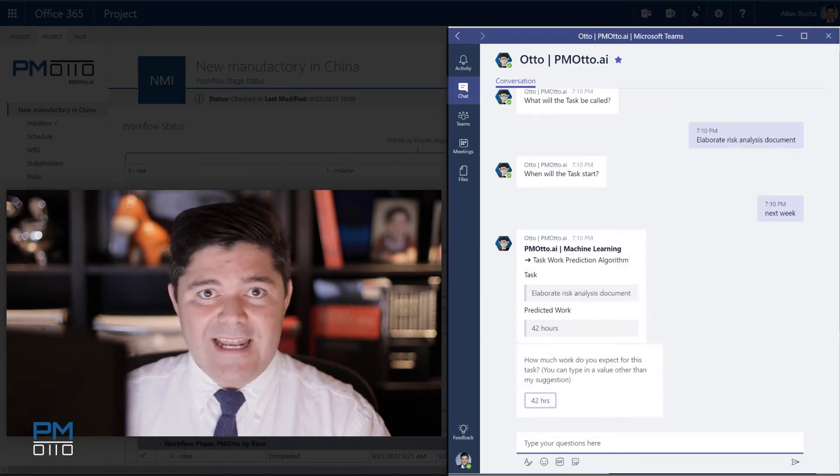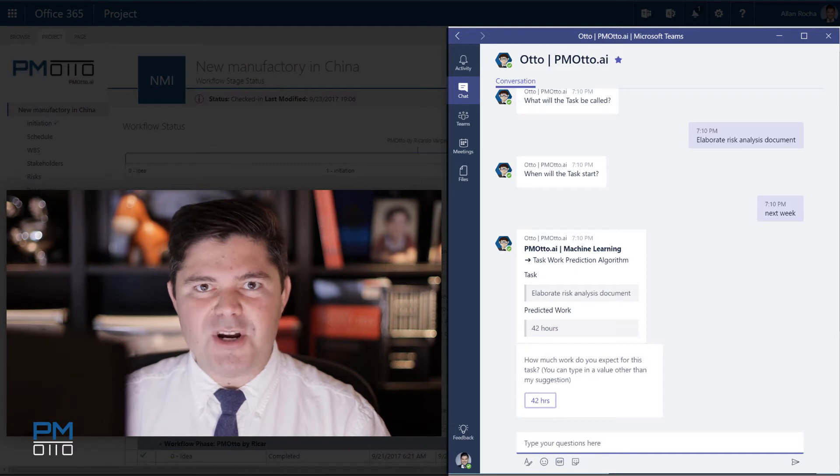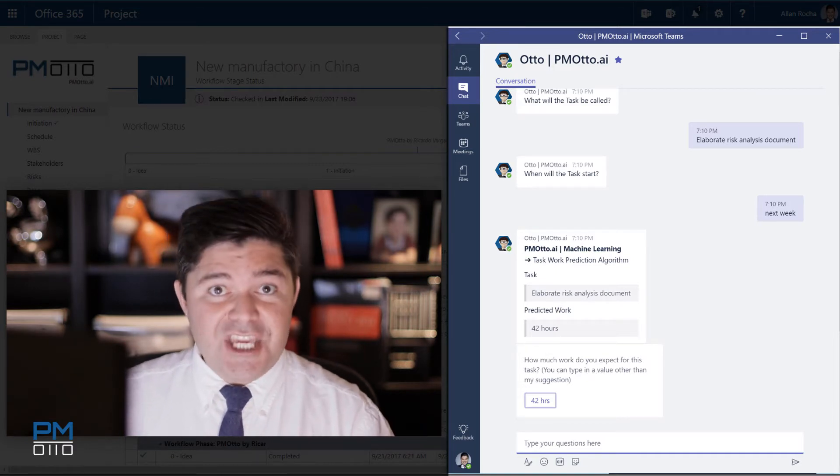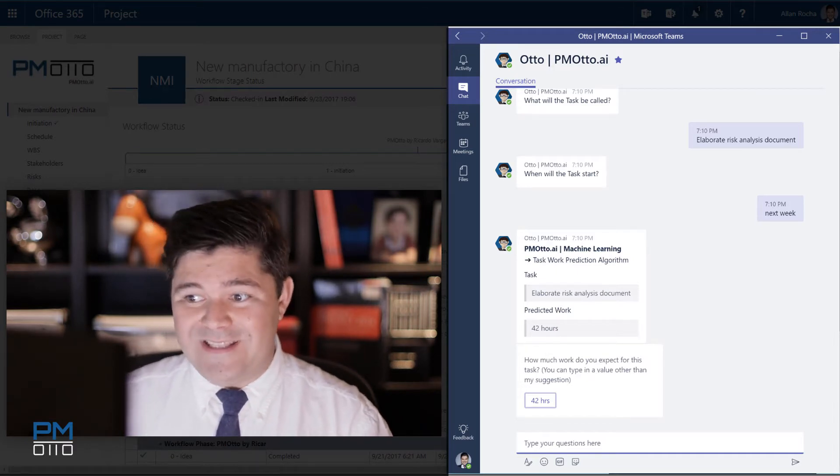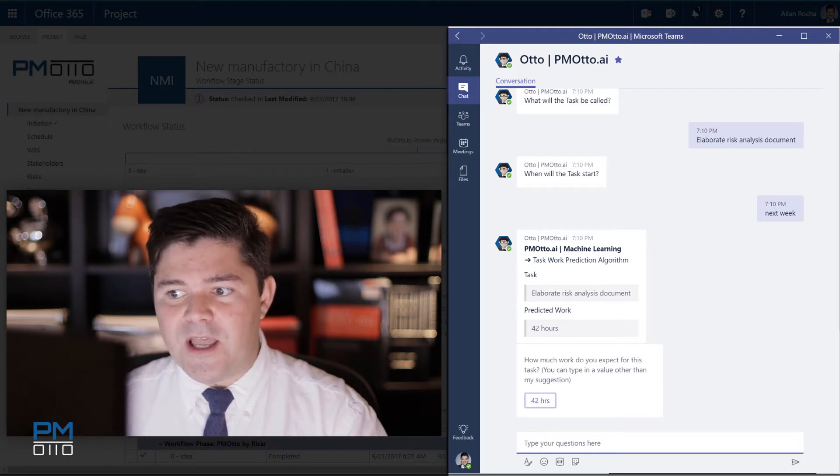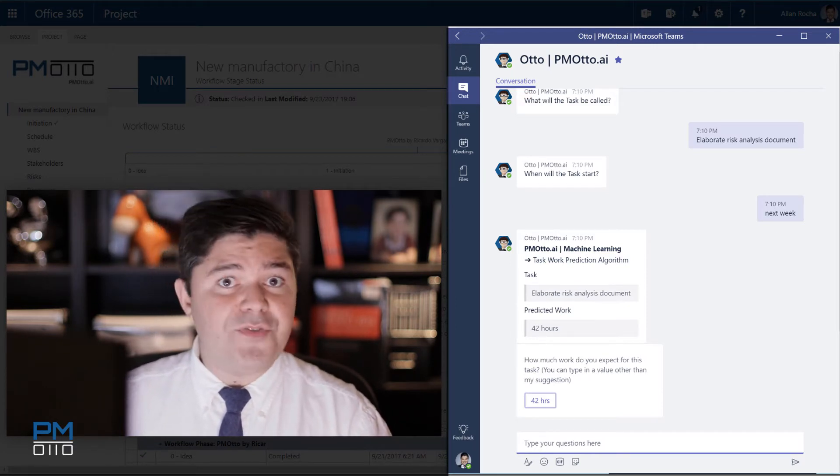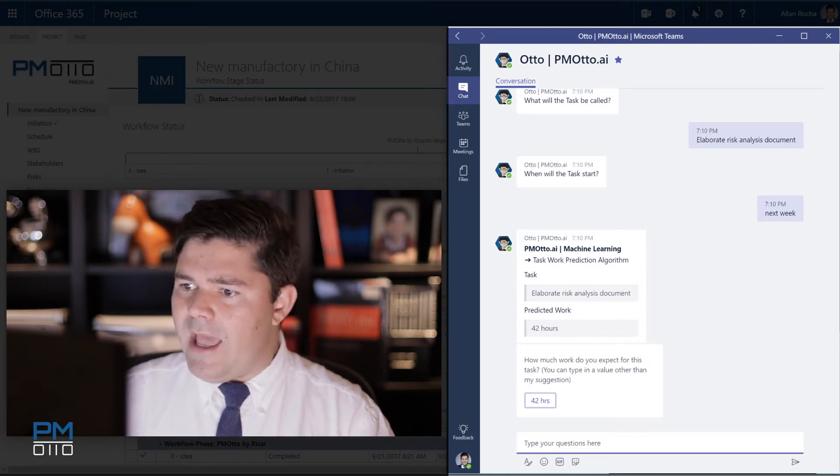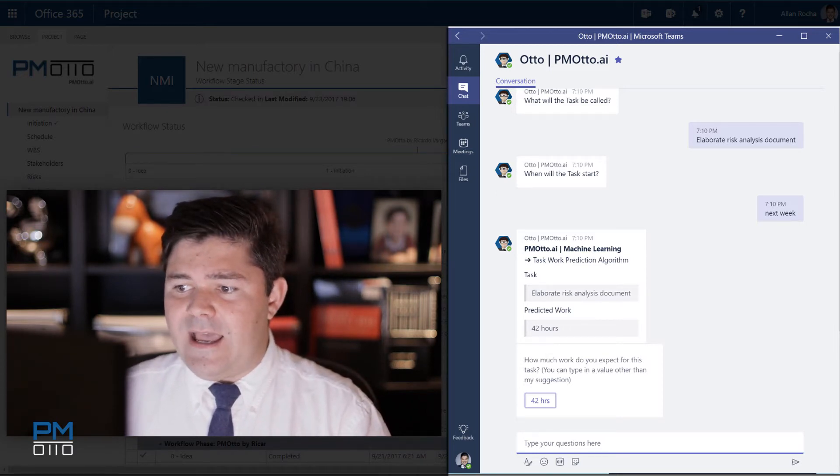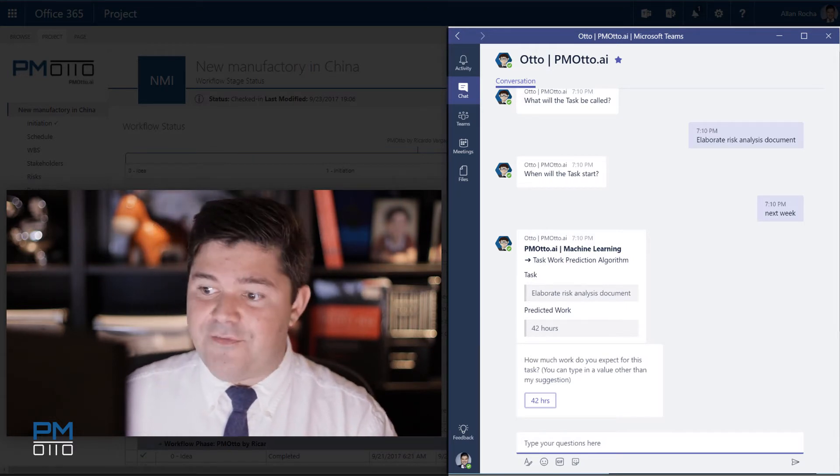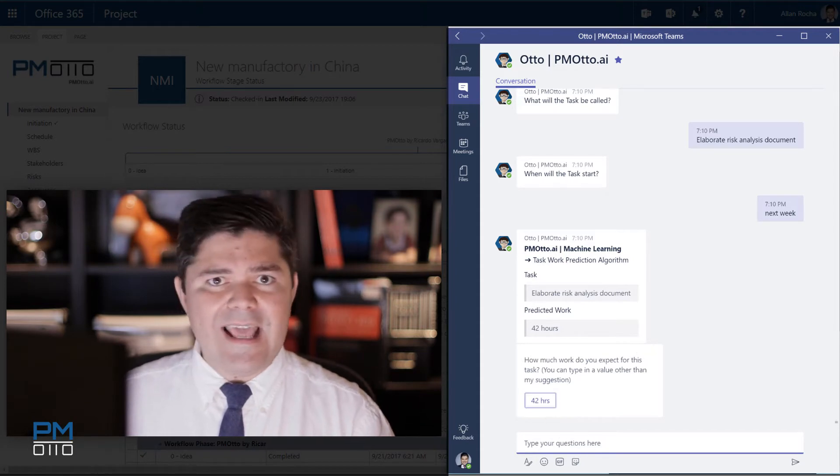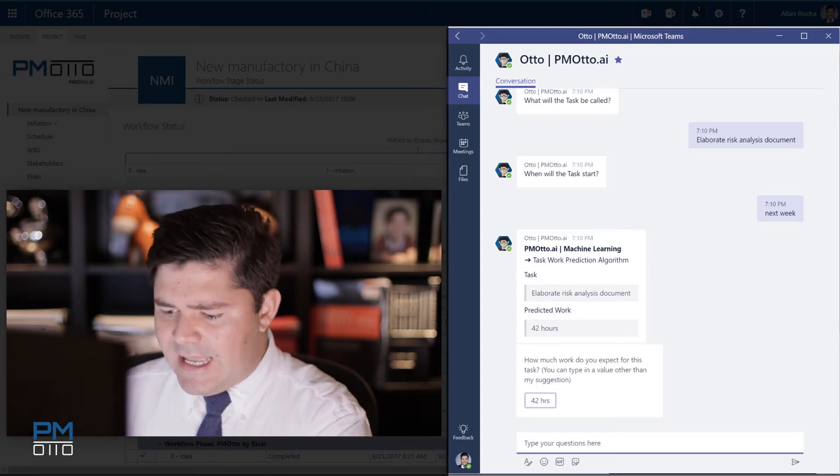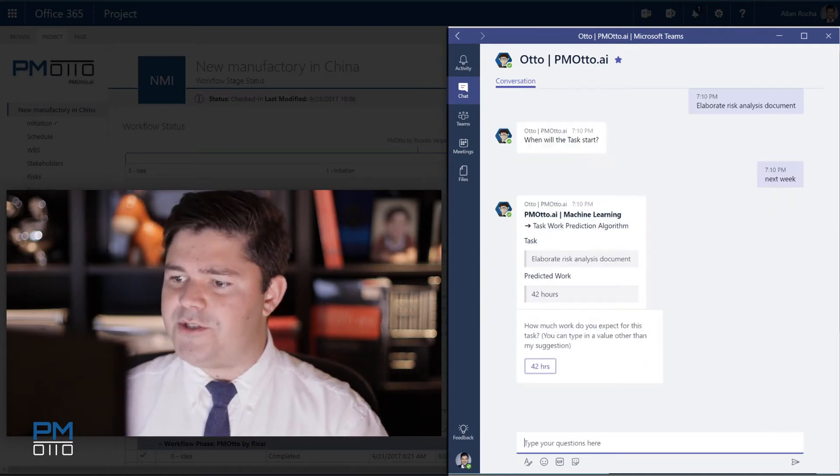Based on this data Otto is now running the machine learning and using the task work prediction algorithm to tell me that the task elaborate risk analysis document is predicted to have around 42 hours. Well that's really good. So how would you expect to use on this task? Otto is now asking. I can select the 42 hours by clicking on the button or I can have my own estimate. I would say that I would like to push the limits and get this done in 40 hours.